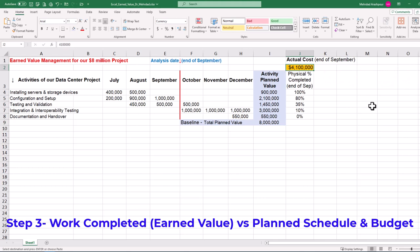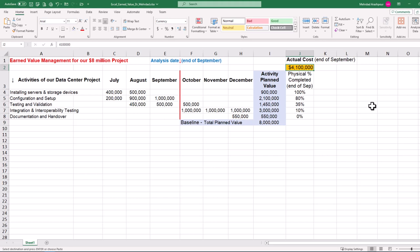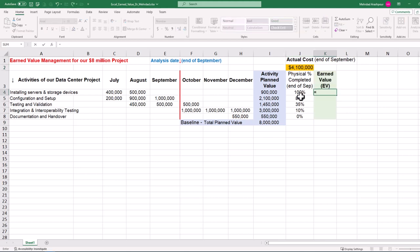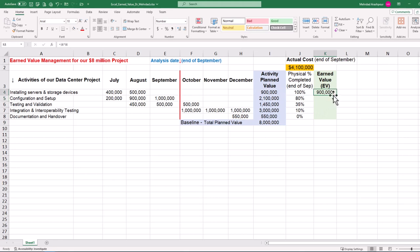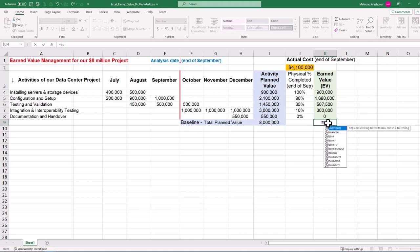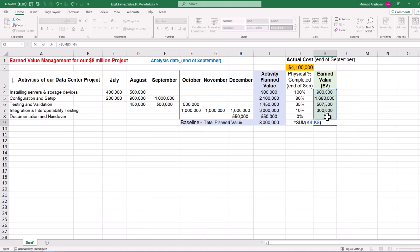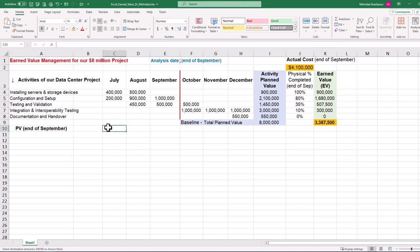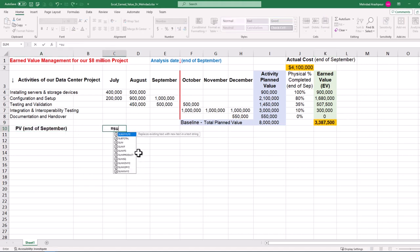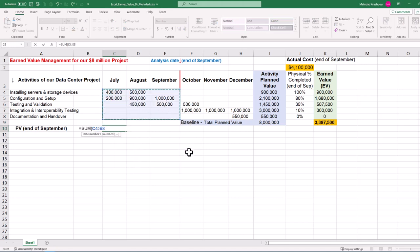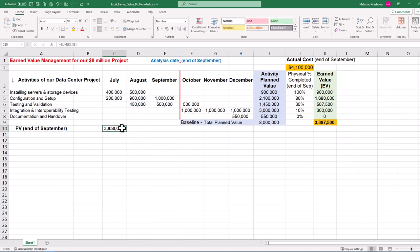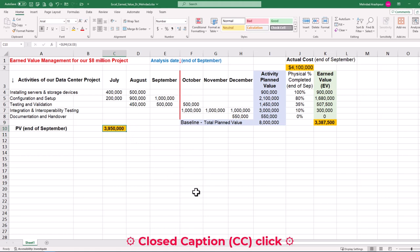Step three is to measure the work completed or earned value against the planned schedule and budget. So far, we have used relevant data sources to obtain accurate information on the actual progress of project activities and actual costs incurred by the end of September. Now we should measure activity earned values by multiplying progress percentages and activity planned values. Following that, we calculate project earned value or EV by clicking on the relevant cell, pressing the equal sign, then using the SUM function to add up activity EVs, finding $3,387,500 as the project EV. We can also calculate PV by the end of September by adding up all budgeted costs of activities until this point in time. The result is $3,950,000, which is larger than our earned value and warrants a thorough analysis of variances.